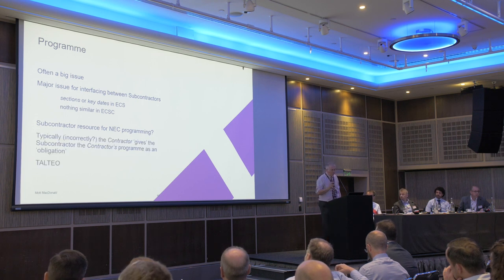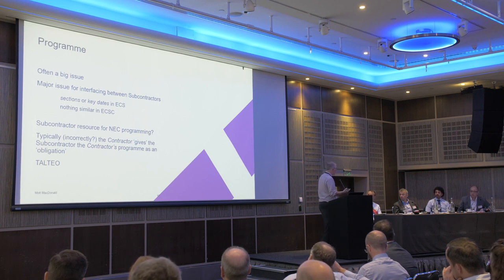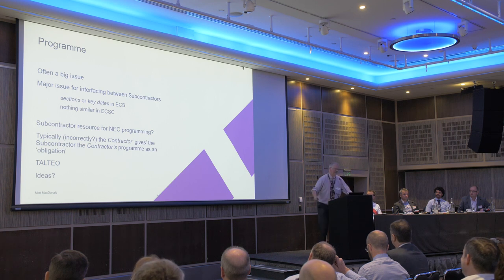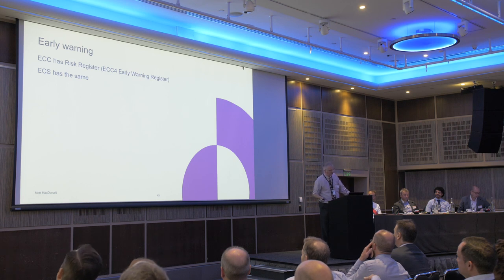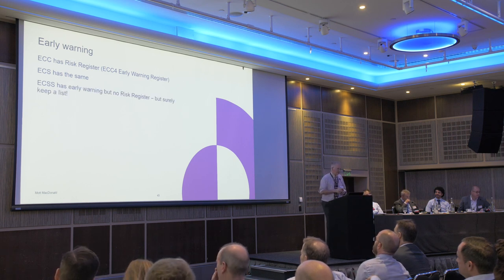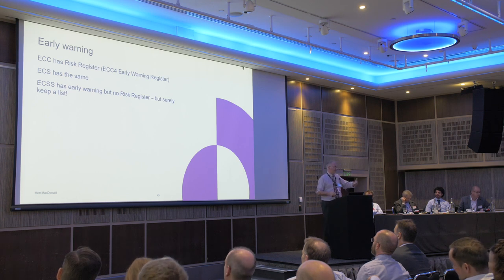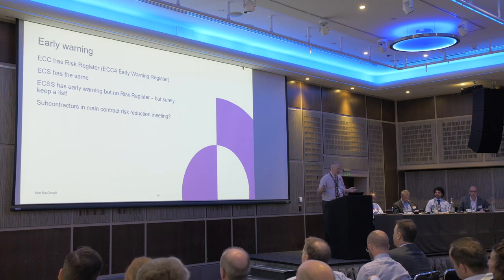All I can say in terms of top tips — the answer is TALTIO: talk and listen to each other, between contractor and subcontractor. ECC has a risk register, the ECS has the same — two separate risk registers going on. The short contract hasn't got a risk register, but we should certainly keep a list of early warnings. Do we get subcontractors into the main contract risk reduction meeting?